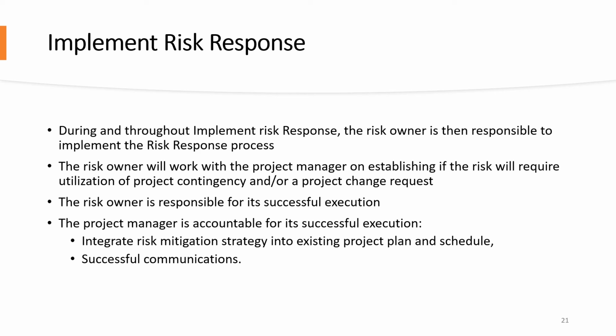Let's say Robert is our procrastinating PM friend. He neglects to follow up with the selected vendor on deployment of our ISP solution. Though we executed the agreement for the new ISP and we internally needed it on or before April 22nd, Robert neglects to keep up communications. Finally, when following up with the vendor, they indicate that they can perform the ISP integration no earlier than April 25th. That brings the project to 3 days of negative float,